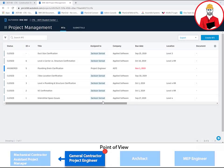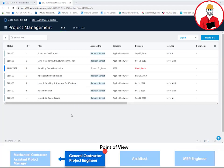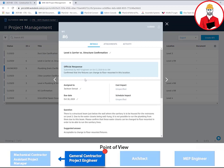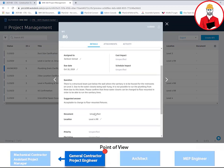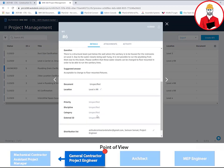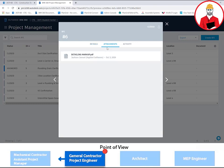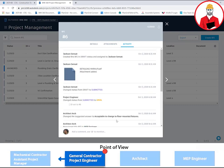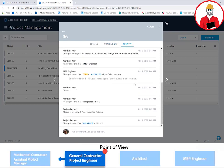Here you can see all of the RFIs that are associated with the project. Once an RFI has been closed, you can go in and see everything that has to do with that RFI, including the question, the answer, any attachments that were included with the RFI, as well as all of the activity. So when the RFI was opened, all the way to when the RFI was closed.